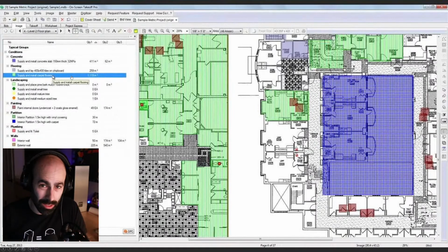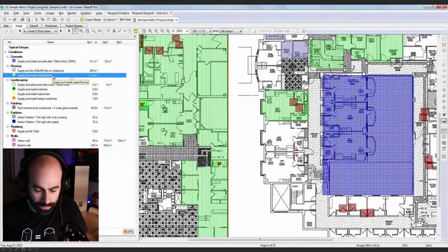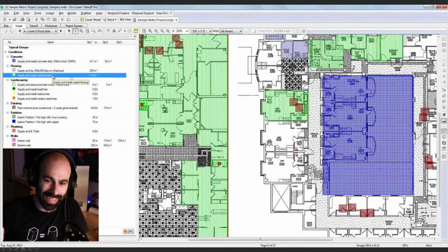And that was when I immediately told my boss, I said, hold on. We need to get the models from the architects, and we need to look into this stuff. Because I can tell you right now, if you called me and I made this model and you asked me how many P2 lights there were, I would right click and I would say select all, or I'd make a schedule and I'd use the model and I'd tell you there's 32 lights. So that's what's happening now.